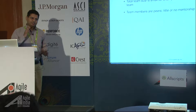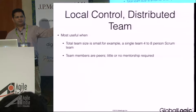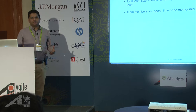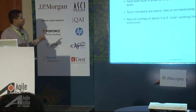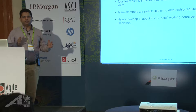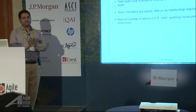A trust deficit starts happening when, for example, the US team has around 20 years of experience and the India team has only 2 years. Those people are constantly teaching the India team — there will be a huge trust deficit and it's not going to work. It is very important that a natural overlap of four to five hours exists in the time zones. This can work with Australia or Europe, but if you are in extreme opposite time zones, it is not going to work, because knowledge exchange requires core hours.